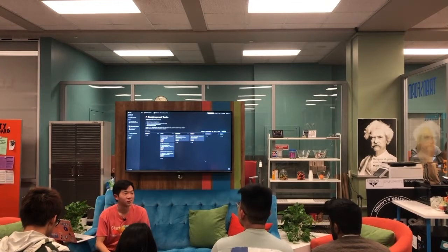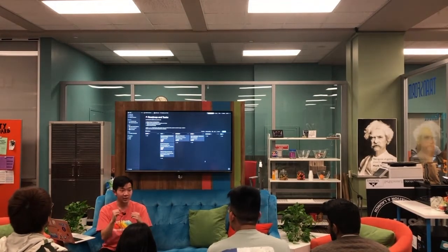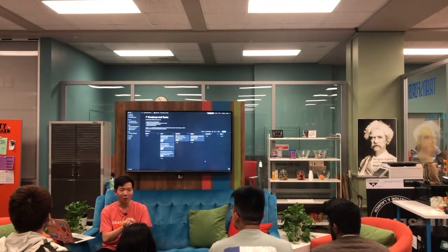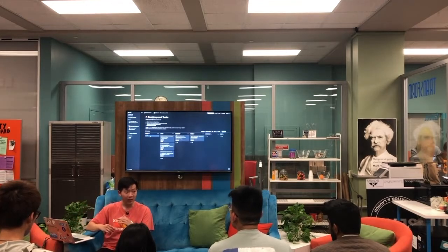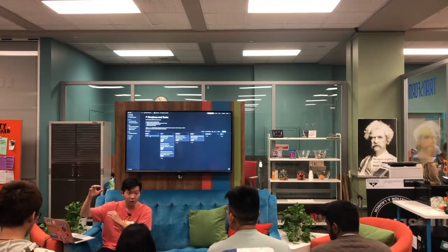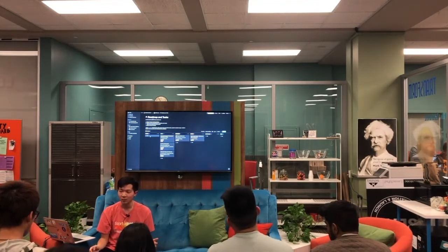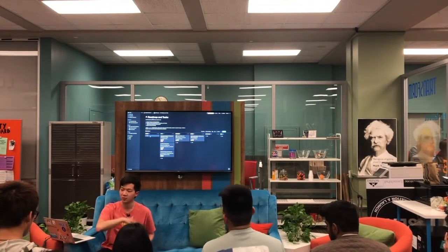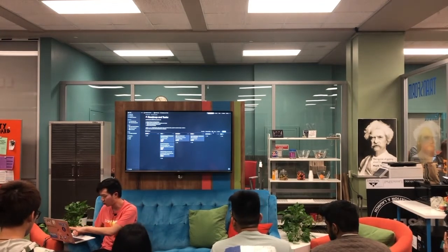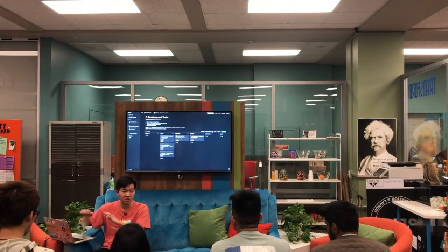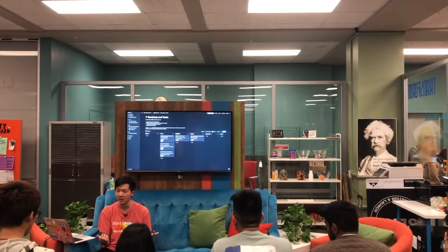Okay. Cool. So I think every single time that you break down an epic, you should probably break it down all the way, put all the tasks in the backlog, and then prioritize and put to do. To do should only be what you're doing for the certain week, right? And then backlog is everything else that has to do with that epic. And this is totally variable as well, so you can modify it to whatever fits you guys and your needs the best.